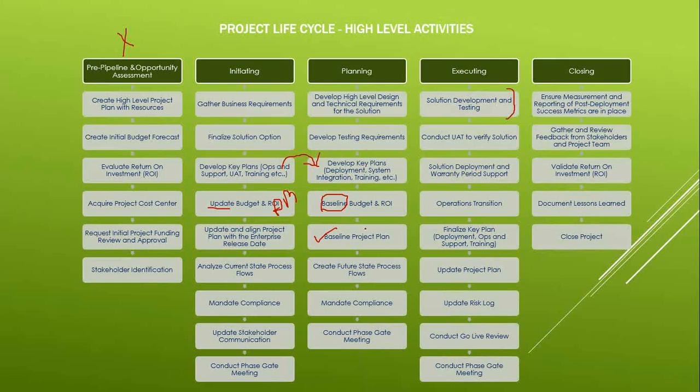Okay. So here you have created the test cases and the test plans and had them approved, but here you are executing them. Once the coding is done, you start with the system integration. Once system integration is done, you do the UAT. Once all these are done, depending upon whether there are no outstanding defects or anything, and everything is all set to go, you go and do the deployment.